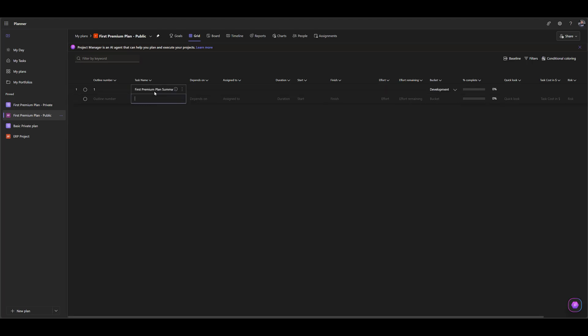And then I should create phases. Whatever that means, you should group your tasks. So if you have, let's say, some development which is going to be in multiple phases, phase 1, phase 2, phase 3, or you want to design, develop, test and deploy, then you can do it as well. So let's say that we want to do it this way: design.